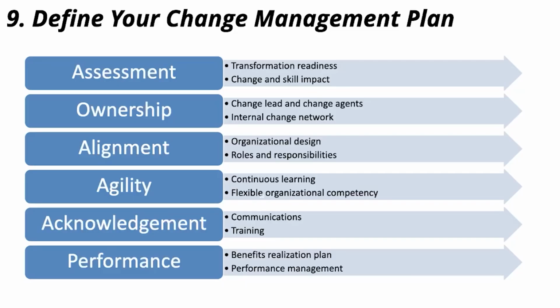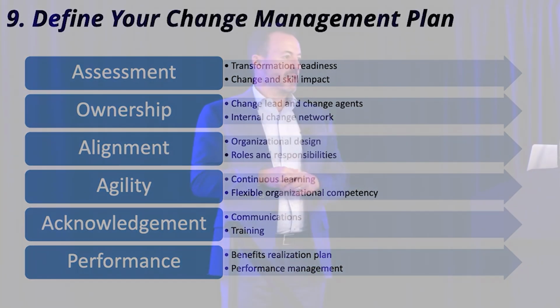And then this is important too, defining your change management plan. It starts with how big of a change we're going to impose on the organization. If you think of it as a scale of 1 to 10, 10 being massive change, 1 being more of an incremental change, and obviously everything in between, you have to say, well, if we're at 9 out of 10, that implementation plan is going to look totally different for that exact organization if they were a 2 out of 10. And again, these are all deliberate decisions we're making.